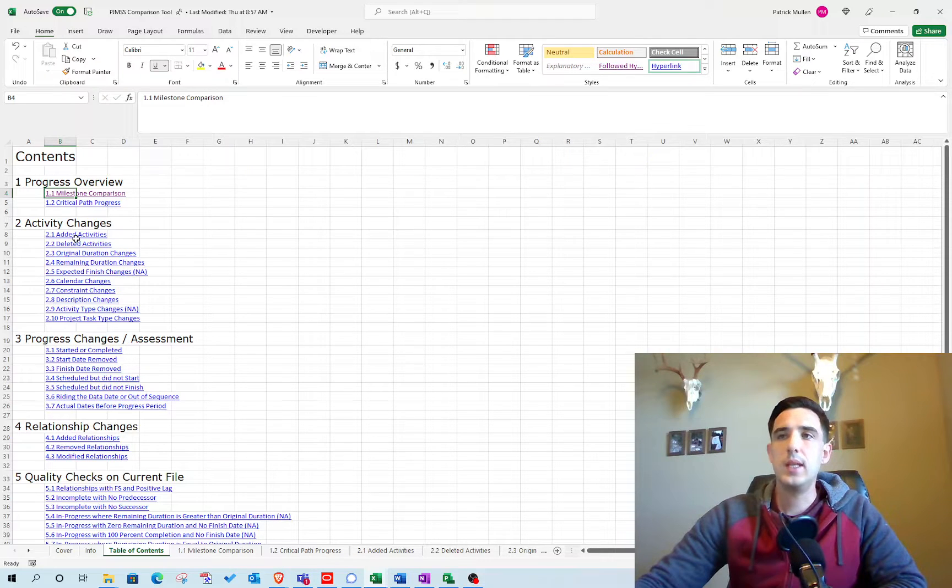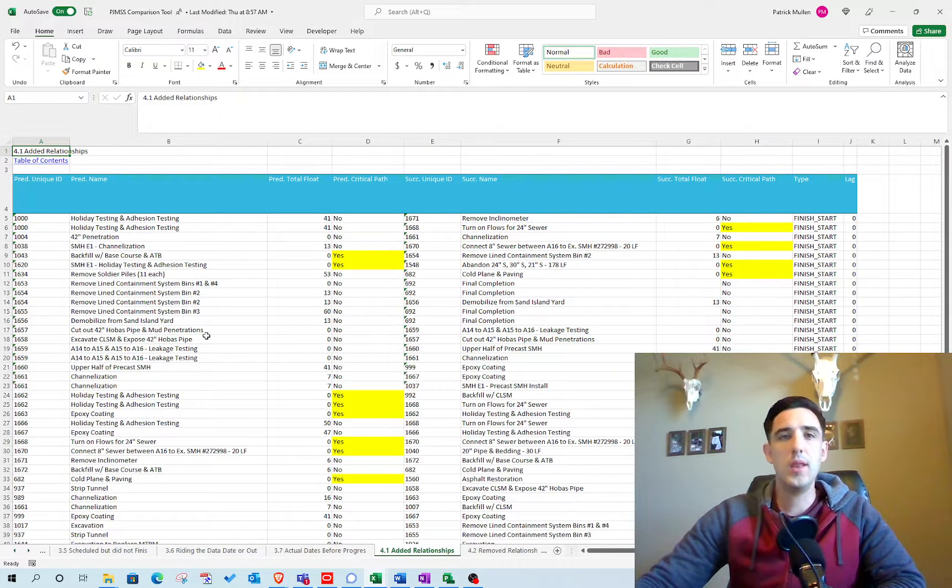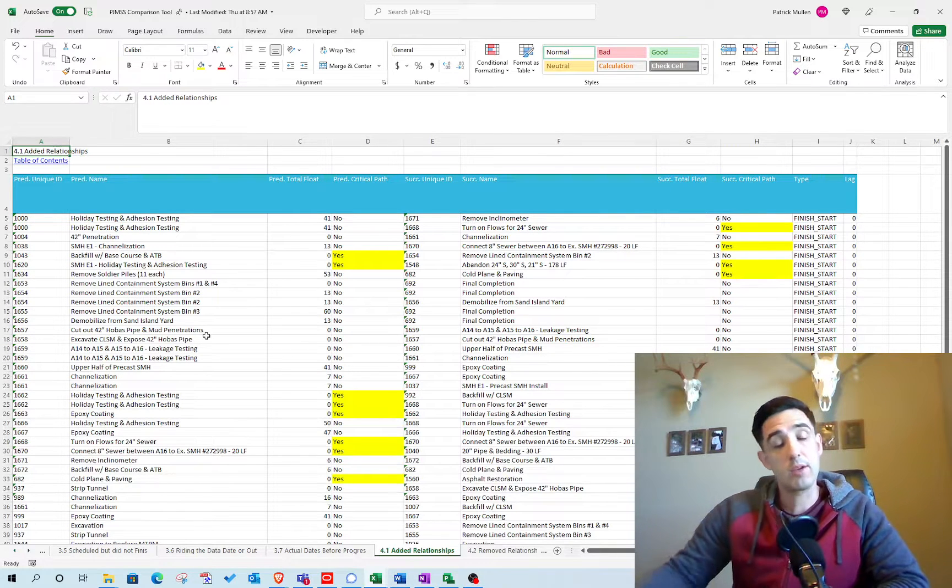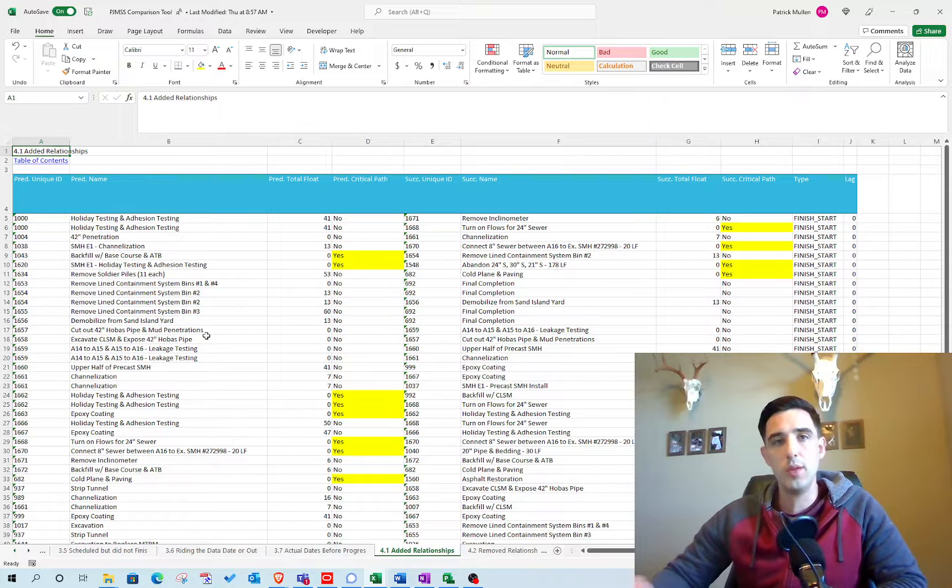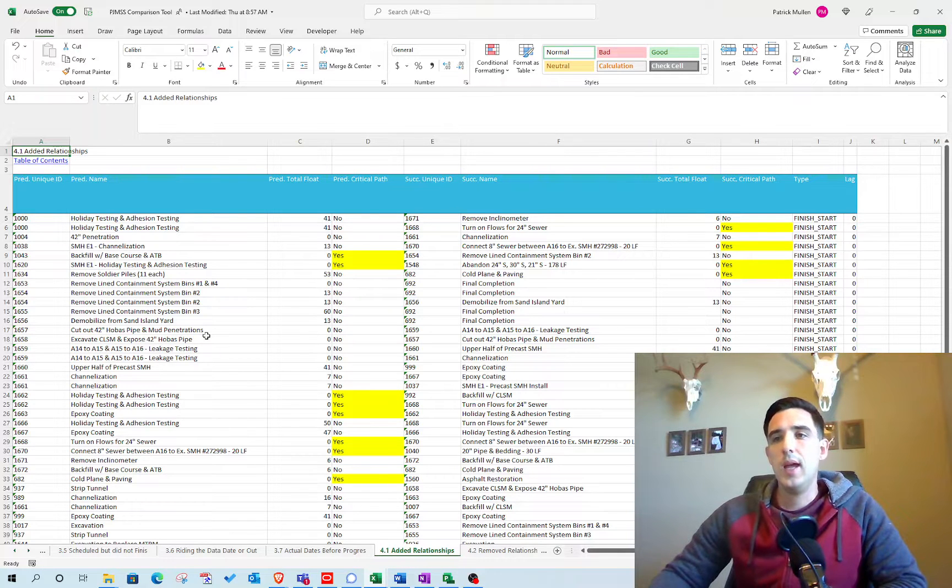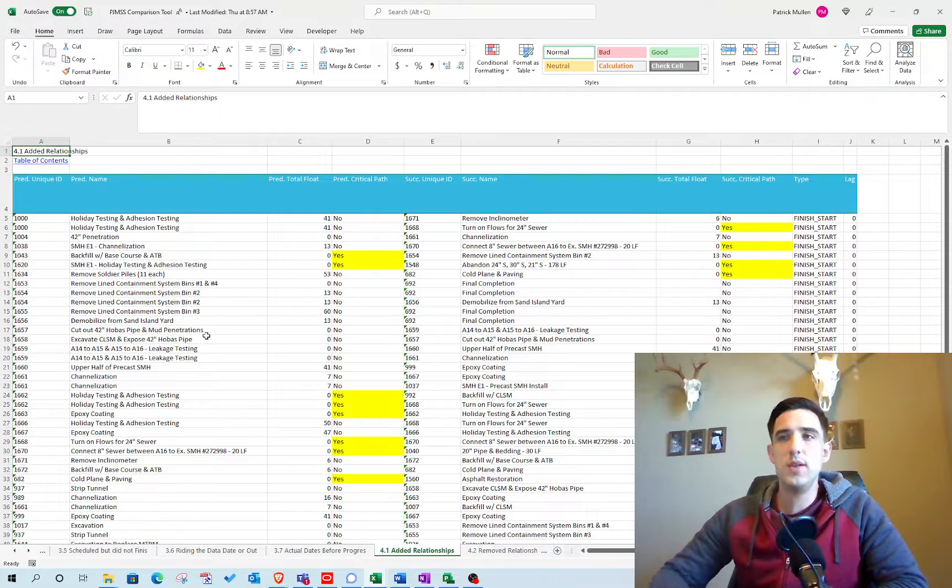If you're looking for things like added relationships on the Microsoft Project comparison tool, the internal tool, it'll tell you that there's differences just because rows had shifted.